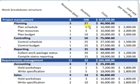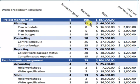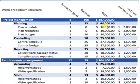For plan schedule you need 8 days, for plan resource you need 5 days, and for plan budget you need 10 days — so in aggregate you need 23 days. Similarly for costs: plan schedule requires $16,000, plan resource $10,000, and plan budget $20,000 — totaling $46,000 in aggregate for the planning phase.